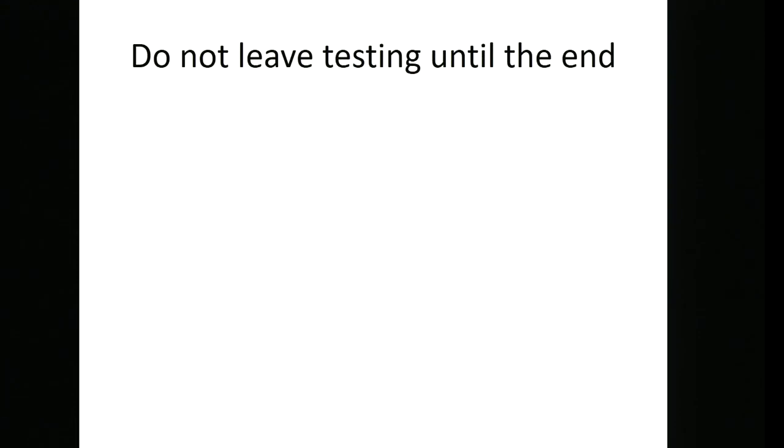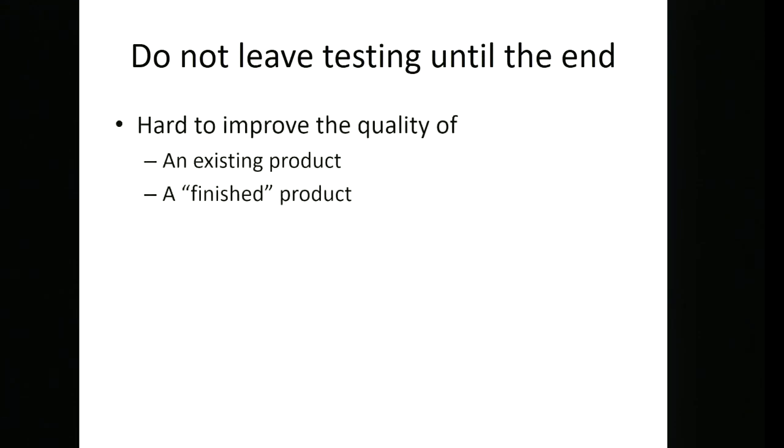If you don't do testing till right to the end, how do you improve the quality of something that is already finished? It's a lot more difficult, a lot more time consuming, a lot more expensive to go back and improve the quality of something which is already finished. So this is why we test as we go through and keep an eye on this sort of thing, so that we can make sure that the quality is high all the way through, and once we're finished, the quality is just high as a result of it being kept high.